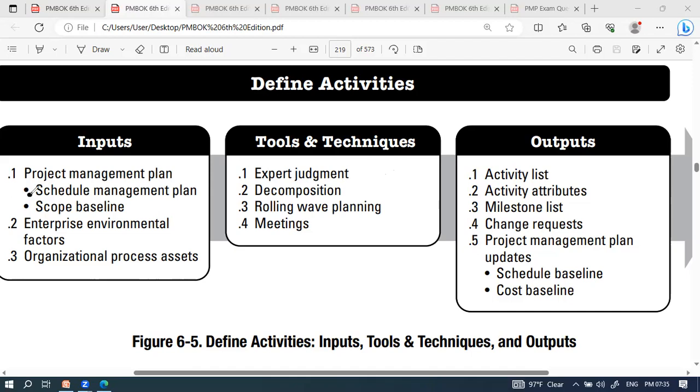Once you are establishing the scope baseline, we have to establish 3 baselines, right? What are the 3 baselines? Scope, schedule, cost. And once you integrate the scope, schedule, and cost, you'll get one more baseline: the baseline of baselines, the PMB. What is that? The performance measurement baseline. This will be used for you to compare your actual work, right?